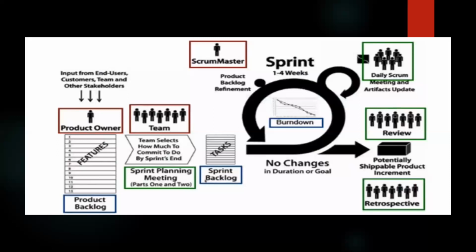Here, each day the sprint team has a daily stand-up, which lasts less than 15 minutes. Everyone reports just three things: what was done since yesterday, what will be done by tomorrow, and blockages. These things the sprint team updates every day in the daily stand-up, which is conducted every day for less than 15 minutes.